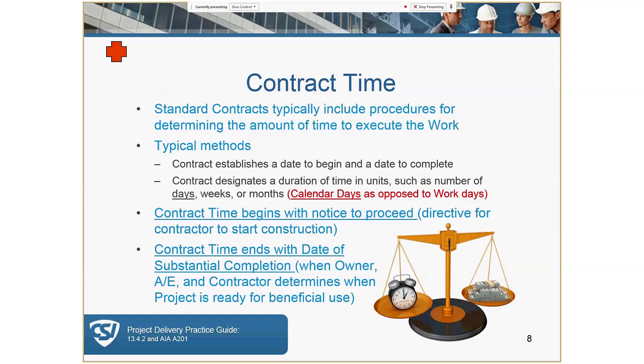We'll cover this in more detail later in the session, but again, when substantial completion has been reached, that's generally when the authority having jurisdiction or the building official has issued a certificate of occupancy, and punch list items are minor, and all of the life safety elements, including alarm detectors and operational systems, are in place, and the building can be occupied by the owner or the general public.